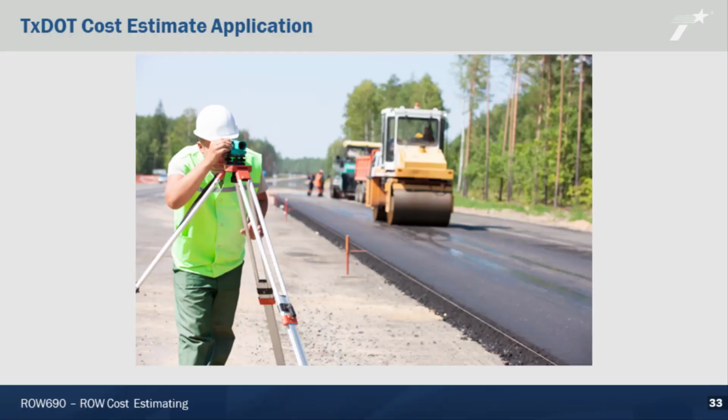Keep in mind that the cost estimate application uses historic CAD data about the properties on your project, and like Google Maps, it may not reflect what is actually on the property currently. So it's still important to drive your project to see it for yourself, in case something has changed since the CAD appraised the property. Still, the cost estimate application is a useful tool to gather information about your project.